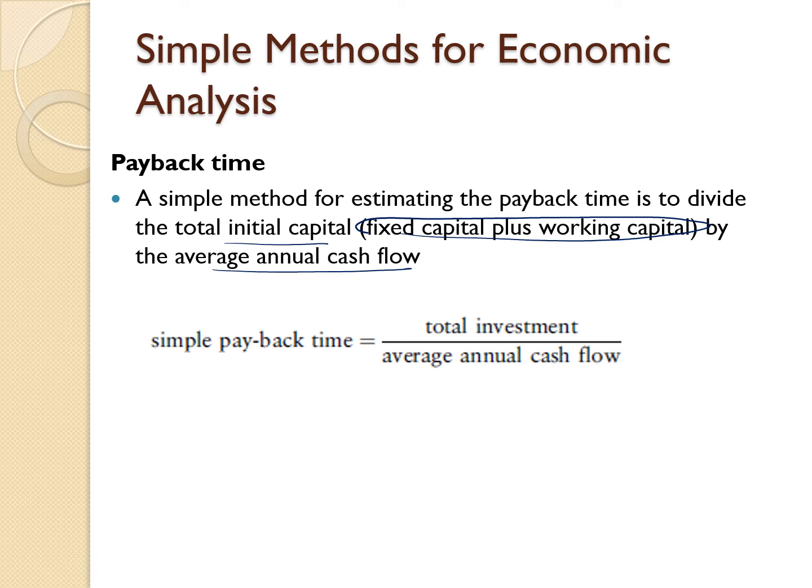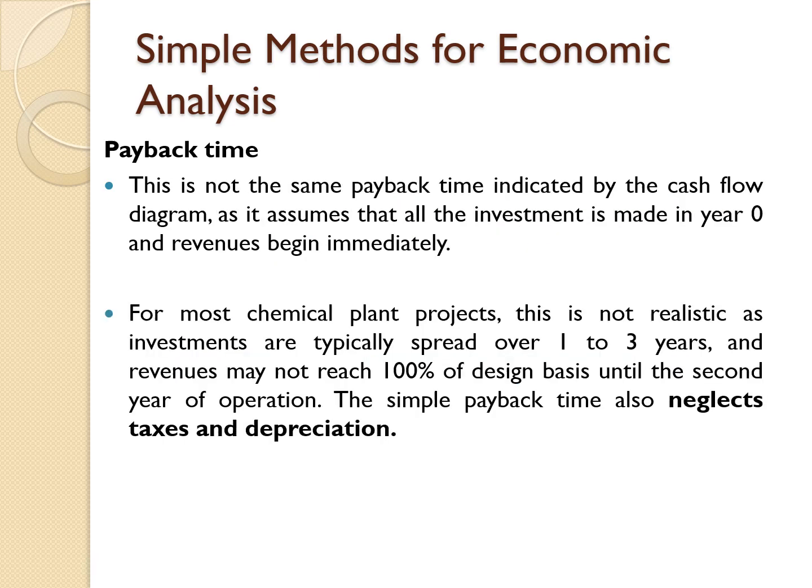Okay, so basically you divide the total by the average annual cash flow, then you will know the payback time. You need to calculate this inside your assessment 7.